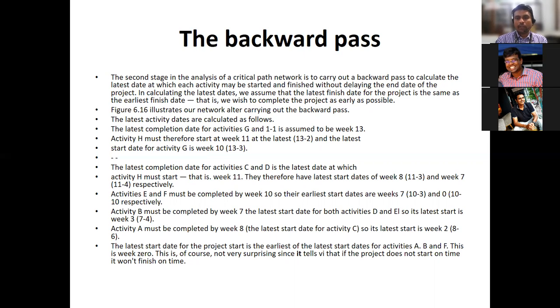So we assume that the latest finish date for the project is the same as the earliest finish date. So we need to have an assumption stating that the latest start date is the earliest start date, and similarly the latest finish date is going to be the earliest finish date. So that is the assumption. With that, we need to start this particular backward pass diagram.